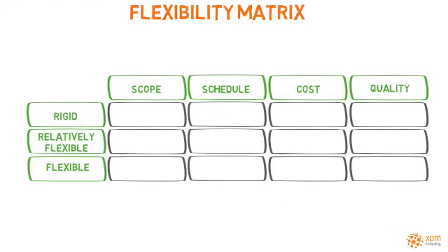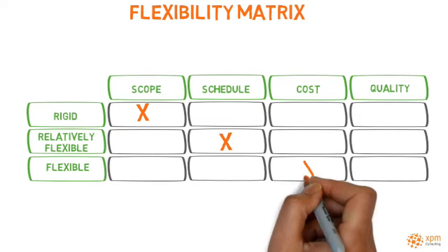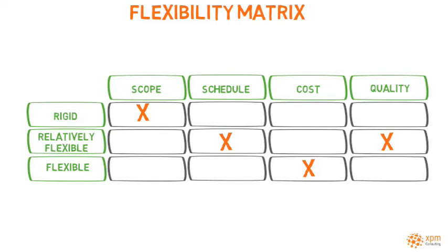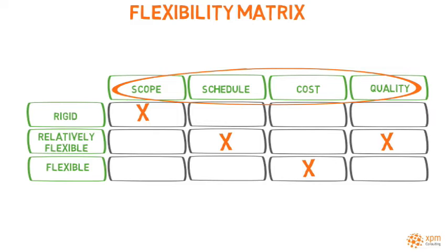The project charter can also include a project flexibility matrix. This matrix is a simple, yet effective tool, which can guide trade-off discussions on scope, schedule, costs, and quality, during planning, as well as monitoring and controlling. The matrix is used to clarify what constraints are fixed, which constraints have limited room to maneuver, and which constraints can be negotiated.